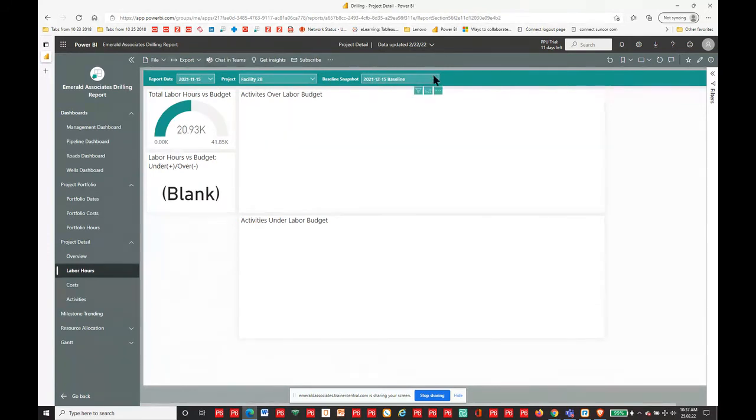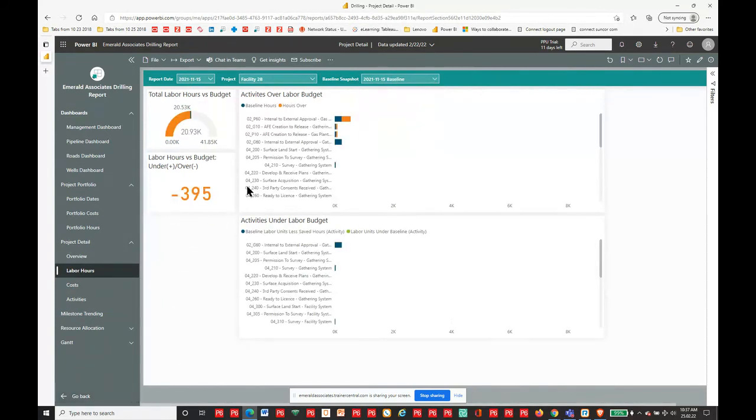And now what I want to do is just set it to the right baseline in case you're wondering why it's not looking correct now. Here is -395. That's where our improvement came in. So this particular project, I know now exactly what the detail improvement was. It was negative 395 last month, and when I change it to the current one, and we'll just make sure that we're looking at the right information here, I'm at negative 120. So not that that is a show-stopping improvement or anything, but it is trending in the right direction.